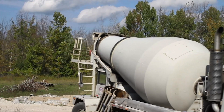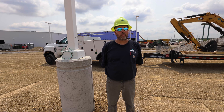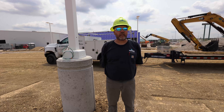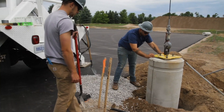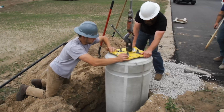As busy as everybody is, trying to get concrete on site has been hard. And it would be a nightmare trying to pour them in place — pull base. It's a huge advantage in trying to coordinate the crew and timing, because then we don't have any type of coordination with sonotubes and rebar on site, worrying about storm weather and what the weather outlook looks like. So we don't have to work any of those into our factors on schedule.